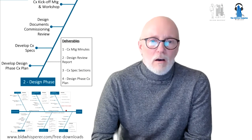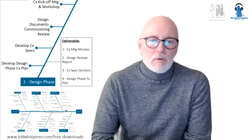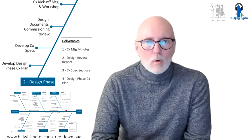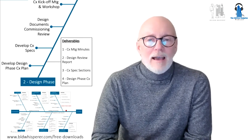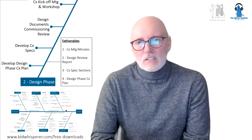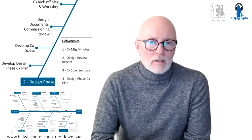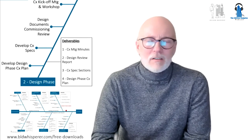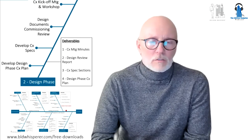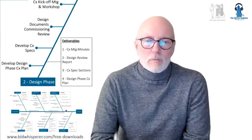So when you hire me to do your job, I will do a design phase commissioning plan. It will be complete except for functional performance test sheets, but it will map out the whole commissioning process. And that will be issued with a tender document so that all the contractors and subcontractors bidding have to include it within their scope of work. There's none of this, I didn't include that, I can't attend functional performance testing. No, it's in there. And then during construction phase, that plan is updated using the approved control sequence of operation.